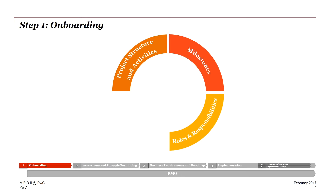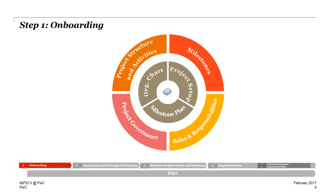Furthermore, it is helpful to define roles and responsibilities for the project. Normally we have a project leader, a team structure, sub-project organizations, the whole team, and also escalation positions such as a project steering committee that communicates and reports to the management board. Finally, project governance should be promoted because it is of high importance, and there is a need to have an escalation charter in case of any struggles within the project. The deliverables for this phase will be an overall project organization chart, the project setup, and the milestone plan.